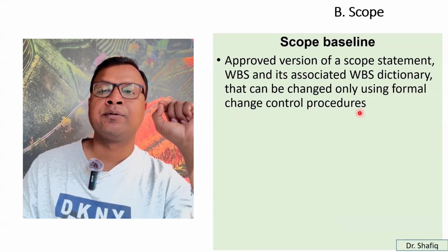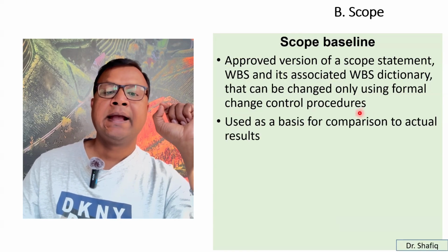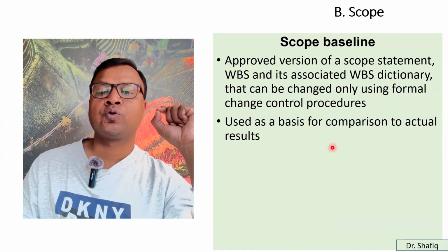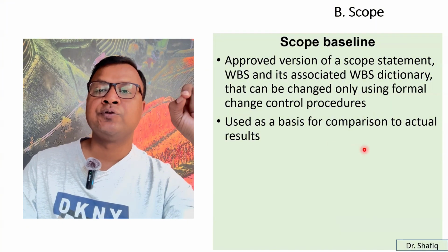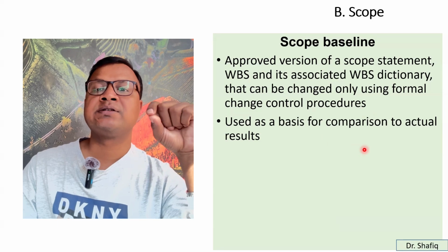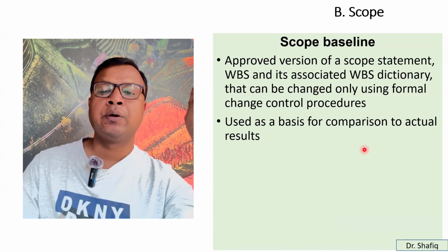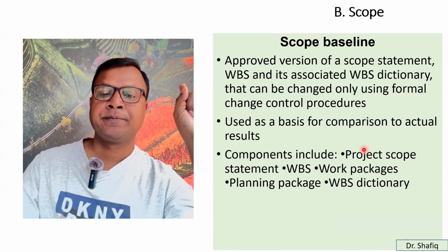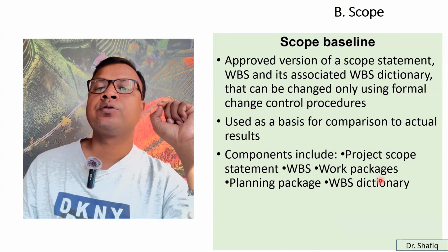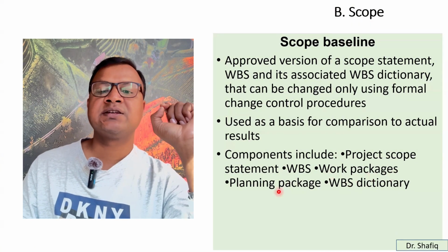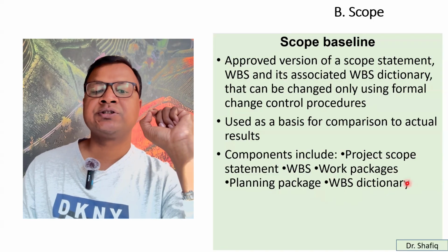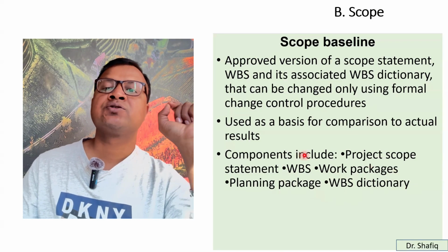I'm talking about the predictive approach. So it is used as a basis for comparison to actual results when you will be working in the future. So you can compare what is the actual value you have achieved and what was the basis. And the components include the project scope statement, WBS, work packages, planning packages, and WBS dictionary, all the parts of the scope baseline.